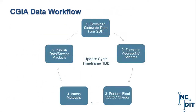This is the envisioned workflow for CGIA to create and publish the data updates. We'd start by downloading statewide data coming out of the GIS Data Hub and formatting it in the AddressNC schema. We'd perform any final QA/QC and completeness checks, fill in any gaps, attach the metadata record, and publish the data and services. At that point, we would also be ready to provision the data to the National Address Database.